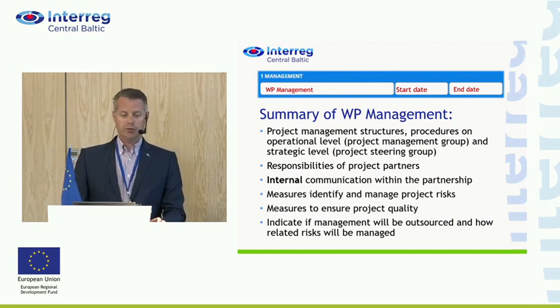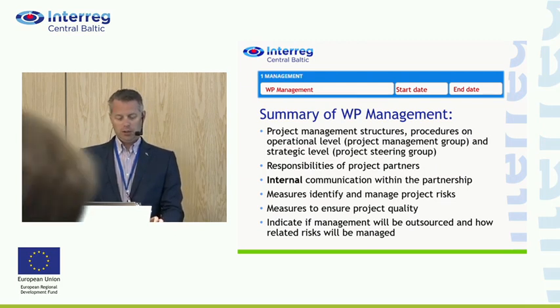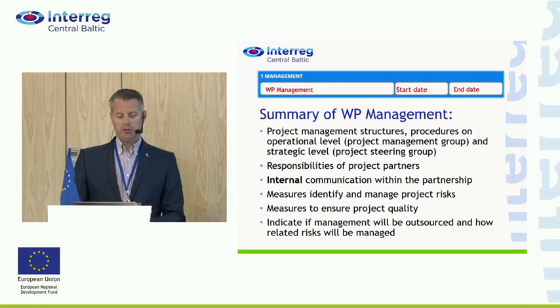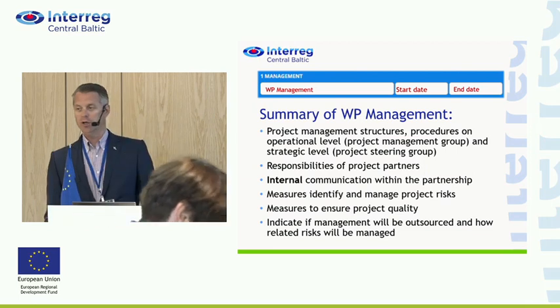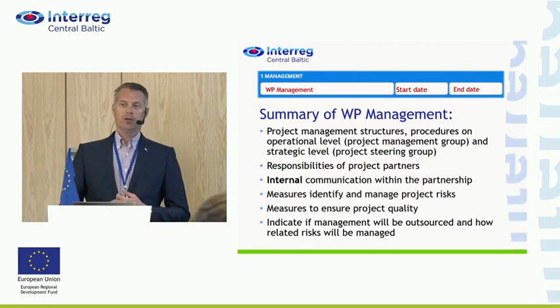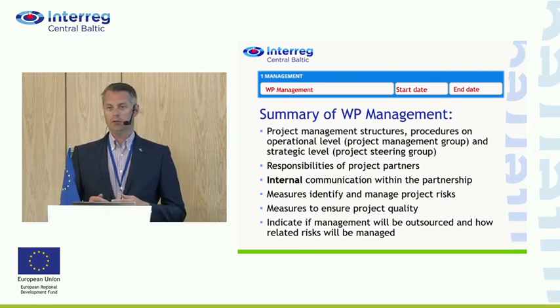We would like to see the responsibilities regarding management described, and we also want to separate the internal and external communication of the project. The internal communication should be in the management work package, while the external communication towards your target groups should be in the communication work package.